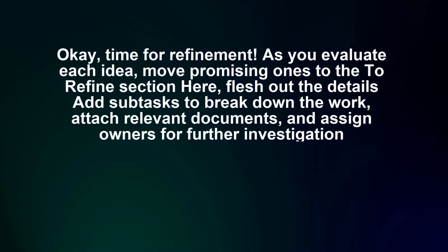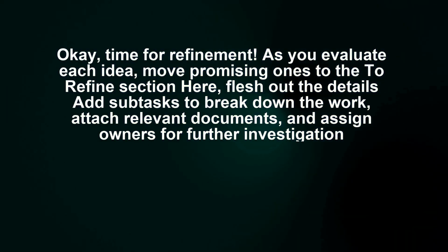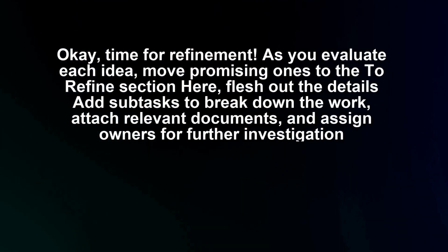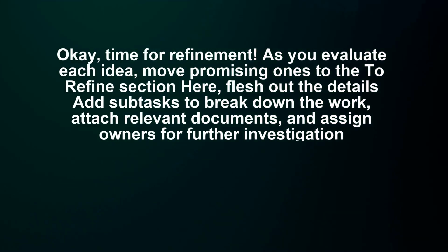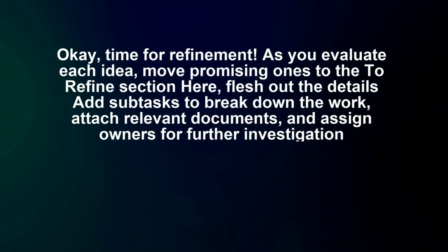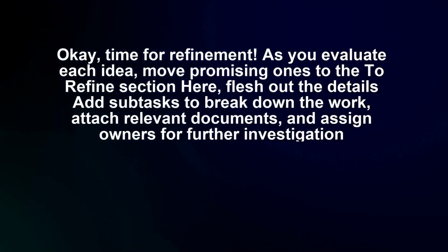Okay, time for refinement. As you evaluate each idea, move promising ones to the to refine section here. Flesh out the details, add subtasks to break down the work, attach relevant documents, and assign owners for further investigation.